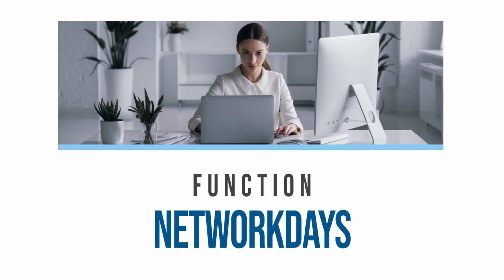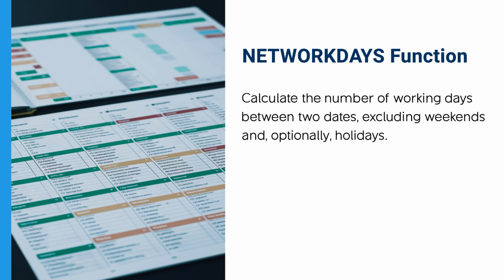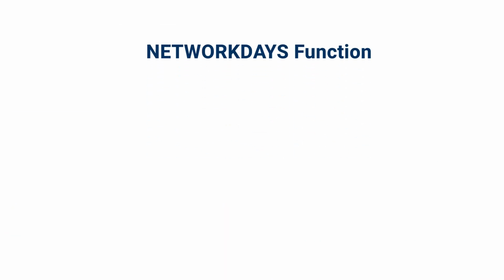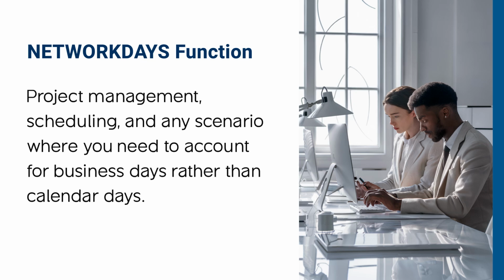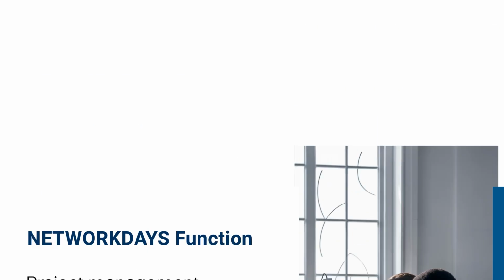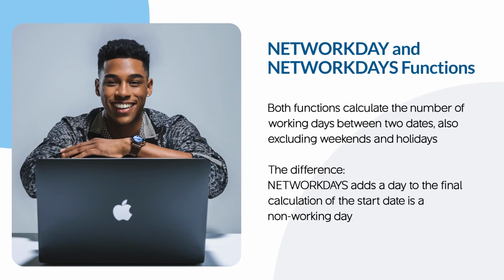The NETWORKDAY and NETWORKDAYS functions in SmartSheet are powerful tools for calculating the number of working days between two dates, excluding weekends and, optionally, holidays. These functions are essential for project management, scheduling, and any scenario where you need to account for business days rather than calendar days. The NETWORKDAY and NETWORKDAYS functions calculate the number of working days between two dates, excluding weekends.